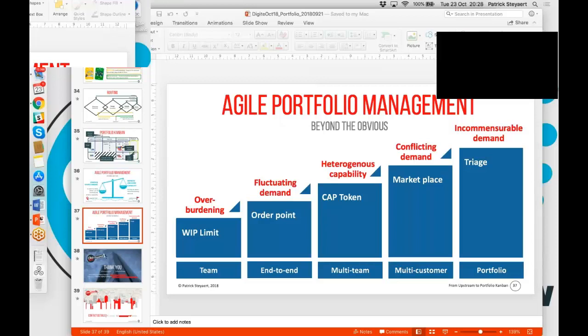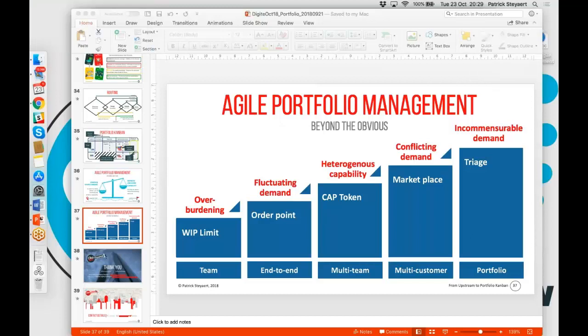That being said, this means that within the different triage values, we still need to prioritize our demands, but then within each class of triage. So within the class of pull demands, the green color, this means that we might still have some prioritization within that triage value. Correct. Yeah, makes sense.